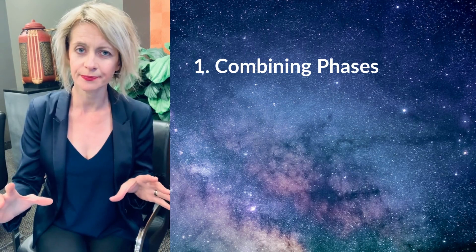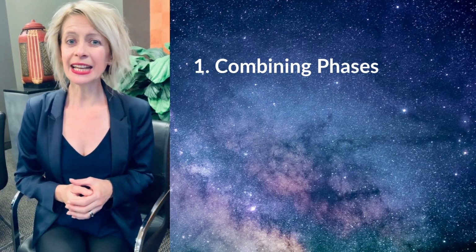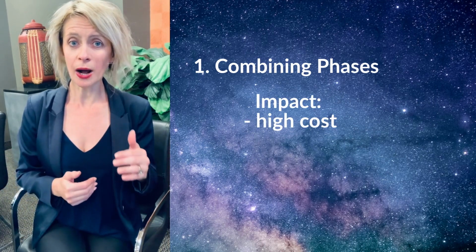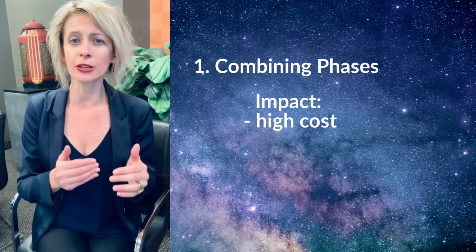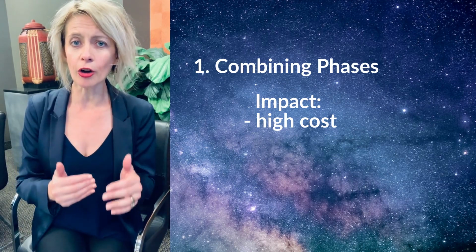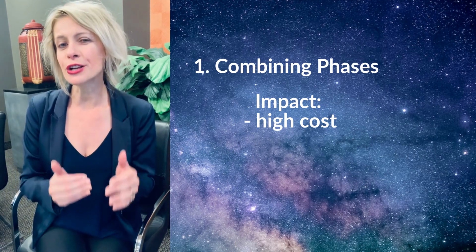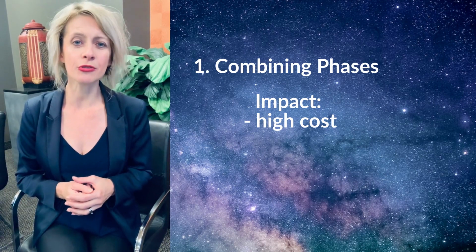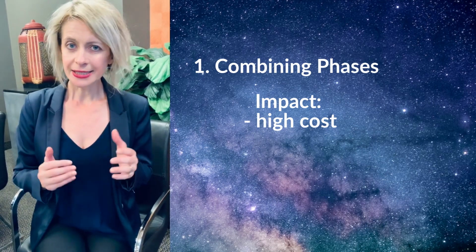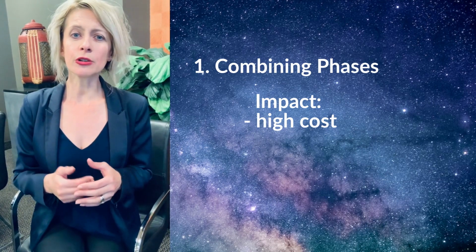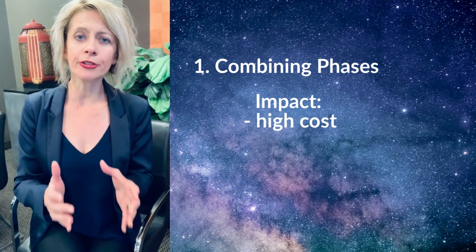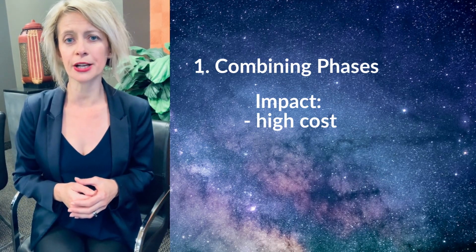Firstly, it can be a high cost, as one phase is strongly dependent on the previous phase and often done by different contractors. It might create a lot of rework and thereby increase the cost. Secondly, teams that choose to combine phases are often under a lot of time pressure.